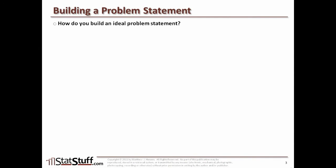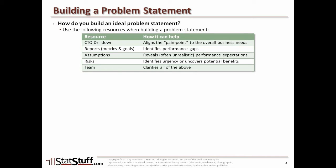Now let's talk about how you can build a problem statement and test its validity. When you want to build a problem statement, there are a few things you can draw on to help you craft that particular statement. For example, you might use a CTQ drill down. This drill down helps you identify where in the business needs and business values you see the particular symptom being felt. That's a great way to identify how you can craft your problem statement and identify the severity of the pain being felt. Also, any existing reports that include metrics, targets, or goals can help in identifying performance gaps.